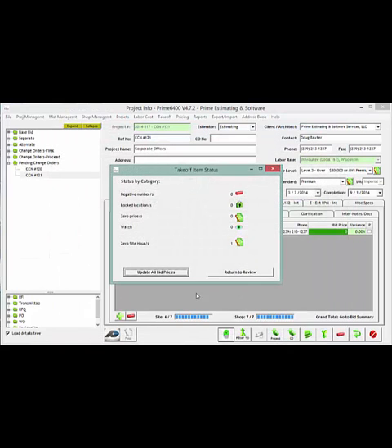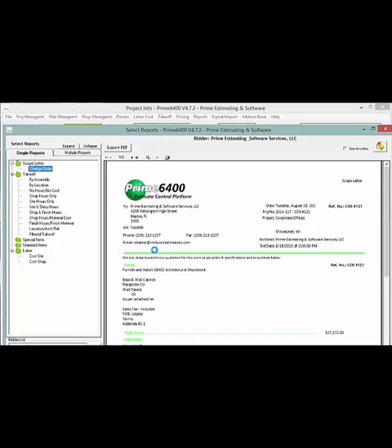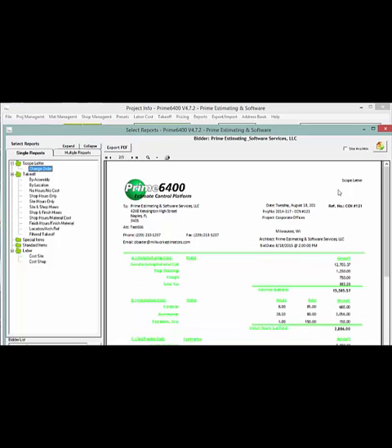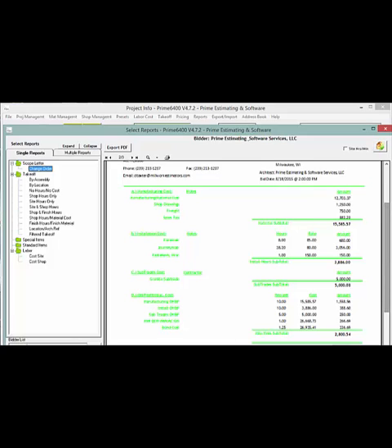So having completed that, we can then come up and do a report on it. And from here, we would go to our reports, change order. And from that change order, we're going to develop this format, which is basically your scope letter. The information can be input manually, or you can indicate as per attached list, just like your typical scope letters. And as we progress through the screens, you'll find now that you'll get a bid summary. Now all of this is provided to the contractor and submitted to him, and all the values have been brought forward as we've put them on the screens that we saw just earlier to come down to your final number.